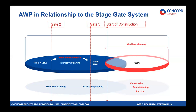Looking at the standard stage gate system — we start with a definition phase, sometimes called FEL2 or FEL1/2, then we move into the FEED phase — front-end engineering and design, also called FEL3 or stage three. The terminology isn't important as long as you associate the AWP components with the timeline of your project delivery system.